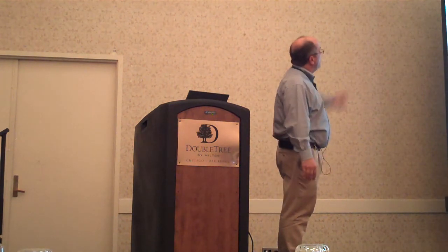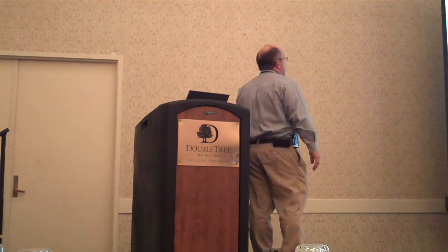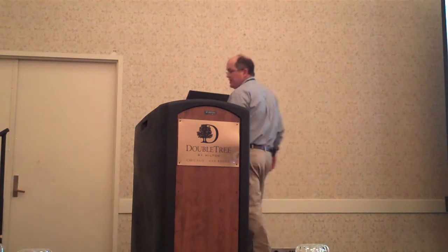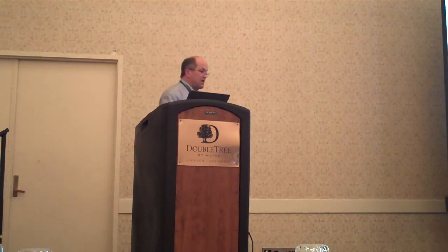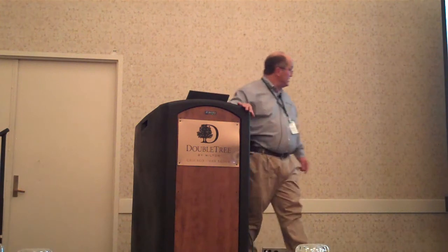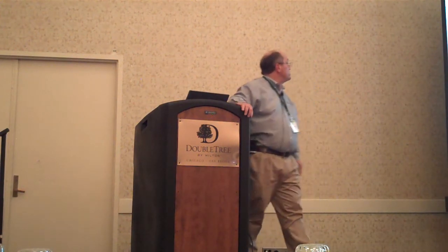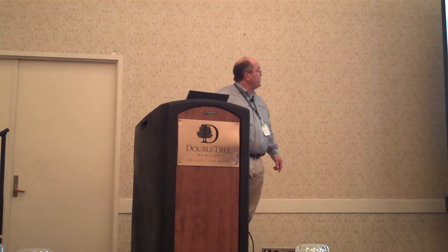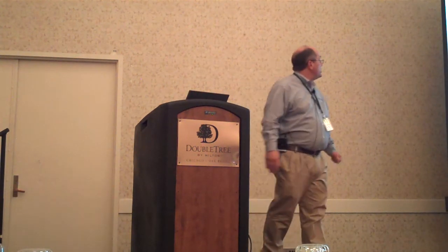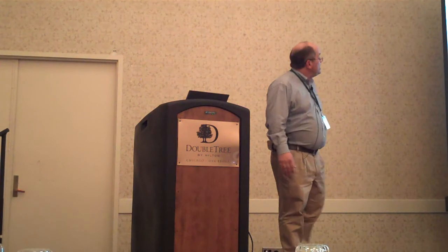And so we created this Word template, and notice some of the pieces that we're trying to capture, right? We need a demonstration script. We need acceptance criteria. The architects always put their 2 cents in, so the delivery approach, how we're supposed to deliver it. And then there's a place for the card rank for the owner to rank the card, and also the team estimate, right?